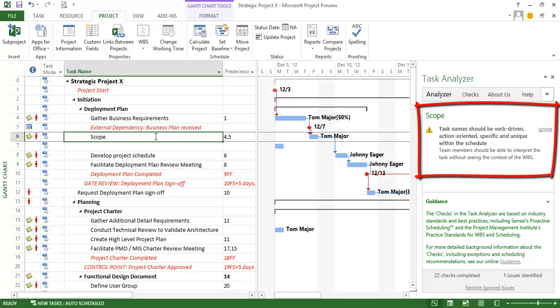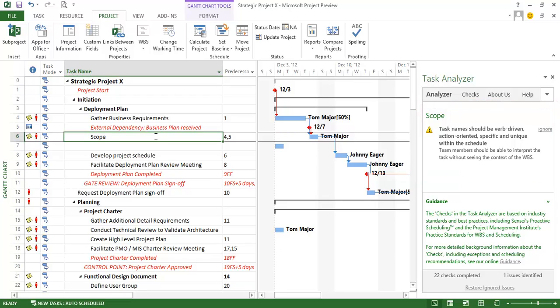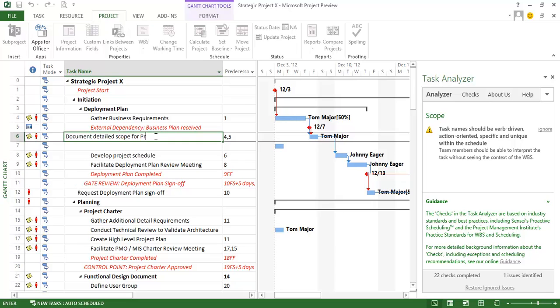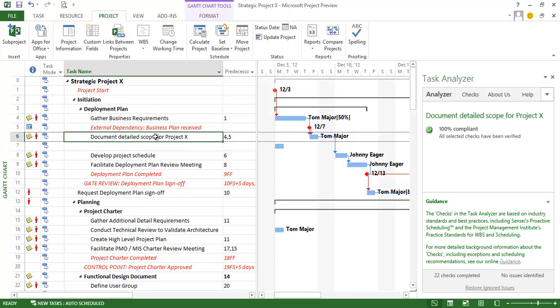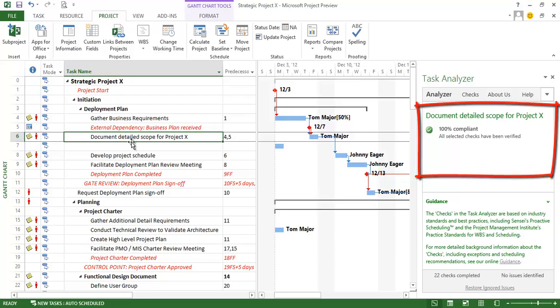The next task here, I get a message that the task name should be verb driven, action oriented, specific, and unique within the schedule. And that's true. I started typing this task name out and then I didn't get any further. So actually what I wanted to do is say document detail scope for project X. That's actually what I intended to do. And now you'll see that I'm in compliance here.